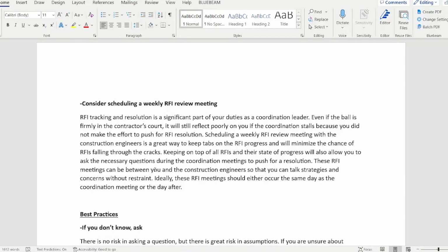These RFI meetings can be between you and the construction engineers so that you can talk strategies and concerns without restraint. So yeah, the contractors don't need to be at this meeting. It's just between you and the construction engineers that are going to be handling the RFIs. Ideally, these RFI meetings should either occur the same day as the coordination meeting or the day after. You want to do it while the information is still fresh.